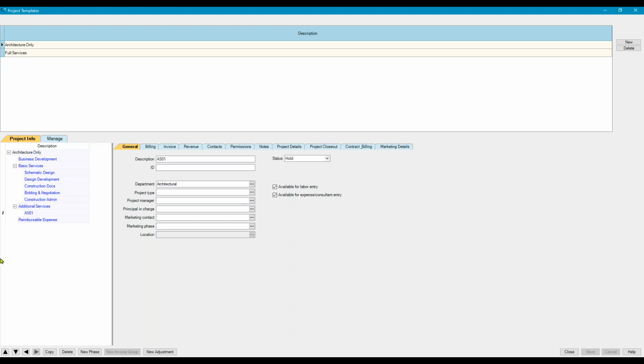That's our recommendation. And then in our model, we prefer to break out reimbursables to their own phase. That is for clarity in reporting and easier management of reimbursables, because we know they can be painful. It's an area where we get pushed back on billing a lot. We do write-offs there. Let's just break them out into their own phase for simplicity.